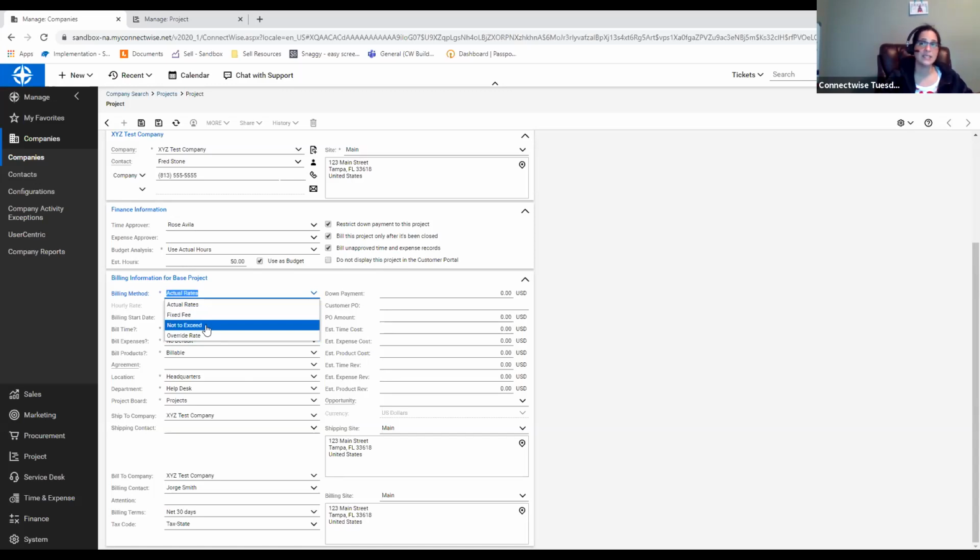Not to exceed says, I am going to bill you time and material. I believe this project is going to take X amount of time, but I'll tell you what, if it goes over that amount, I'm not going to invoice you overage. So an example of that would be if we're coming in with this 50 hours and I'm going to build a cushion in for myself to make sure that I'm in a good place.